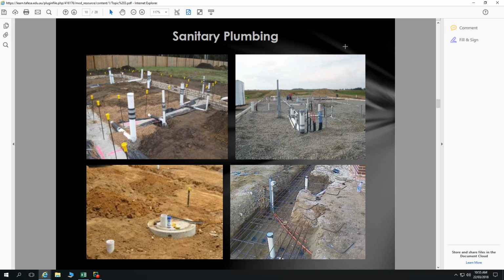So if we're going on site, we've done our design and we've done our specifications. We say all plumbing and fixing work, I think it's AS 4500, don't quote me on that, let's say all plumbing work to be conducted as per AS... And then you go on site and the concrete is booked for pouring that slab in the morning and there's no lagging around the pipes. You're going to have to say, concrete will have to wait, I'm sorry, we need to quickly get some lagging on all of those pipes before anything starts. So that's an important one to look for. This one's got lagging on vertical sections.